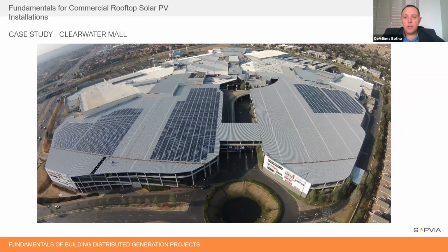And initially what we built is on the right-hand side of your screen that, well, on this picture it seems little. I'll call it a little block for the current purpose. But that was the initial 500 kilowatt peak system comprising 4,000 square meters on the parking roof. And that was commissioned in November 2014.